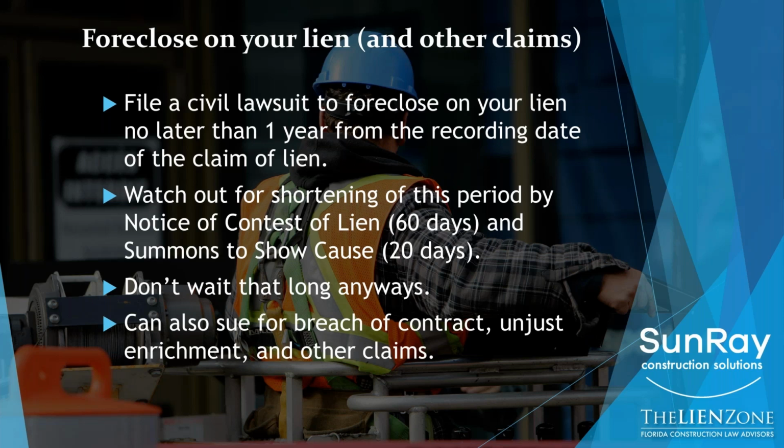In addition to suing for foreclosure of lien, you can sue for any other legal right that you have. For example, you may decide to sue the person that hired you for breach of contract. Maybe you don't have a contract with the owner, so maybe you're a subcontractor, but you know that the owner hasn't paid for the services yet. You can sue the owner for what's called unjust enrichment, meaning you rendered materials or services to the owner. They are unjustly enriched because they haven't paid for it, so they are liable to you for that amount. These are other legal claims that you can bring. There are even many others that you and your lawyer can consider.